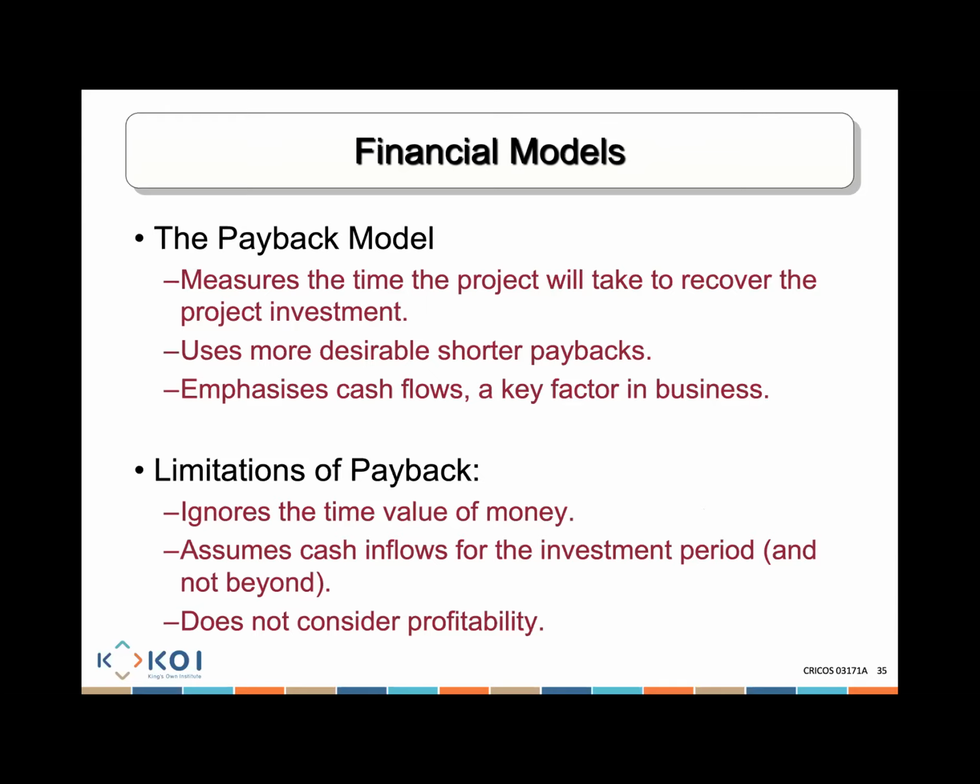So let's say you invest $300,000, and you get that $300,000 back in 1 year. It will say, okay, you will get your money back in 1 year. Oh yeah, great, but how much profit would I make? This method doesn't tell you. What if you make $1 million from it? You might not know. But if you don't have that information, you won't be able to make the analysis appropriately. It does not really consider profitability.